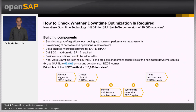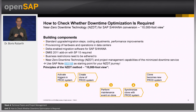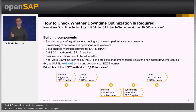The third approach is NZDT — Near Zero Downtime Technology — a service-based approach always involving SAP consulting. At a 10,000-foot view: a clone of the productive system is created and all conversion activities are executed on this clone, while end-user activity on the productive system is recorded and replayed back to the clone. This results in just a small downtime for the final switchover from the productive system to the clone. An SAP note is listed for more information and registration. This concludes the overview of downtime blocks in the technical conversion and the three available approaches. Thank you for listening.